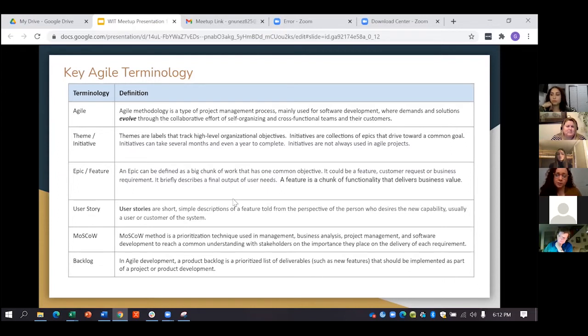And so oftentimes you'd have tech projects fail because it was taking what was said at an initial discovery meeting, taking the consultants away and out of the picture for X amount of time, having them build against what was said that one time, and this is a simple example, but essentially that, and then coming back and saying, here's your finished product. Agile is different in that it's a much more collaborative experience and allows you to adjust requirements as you work your way through and see the possibilities. As far as my experience goes, I'd say 95% of my projects at this point have been Agile.